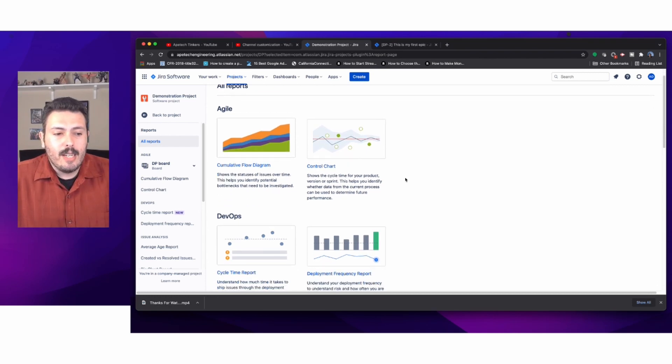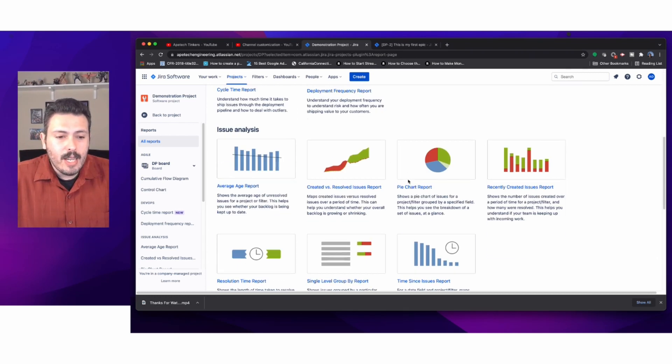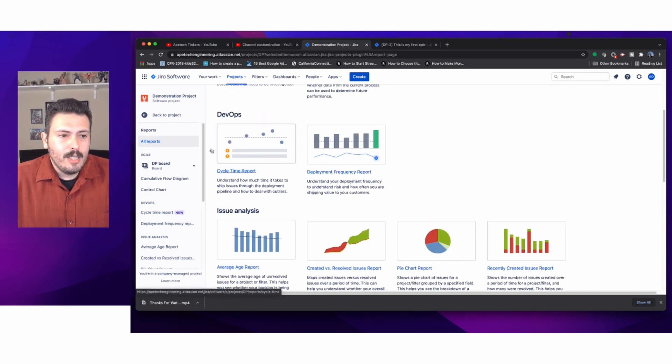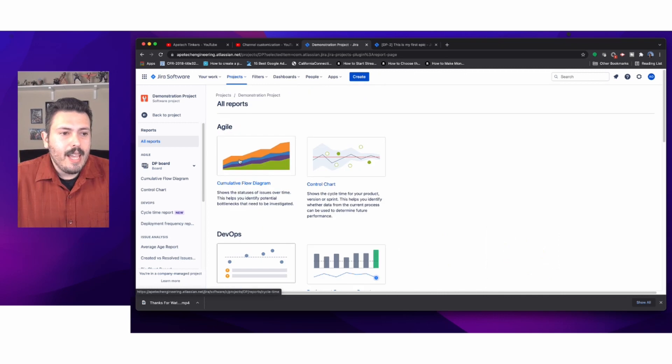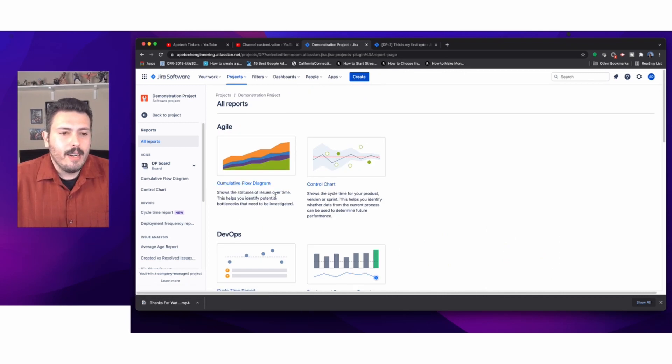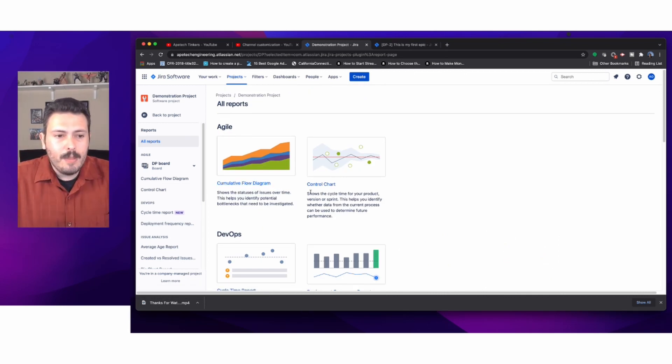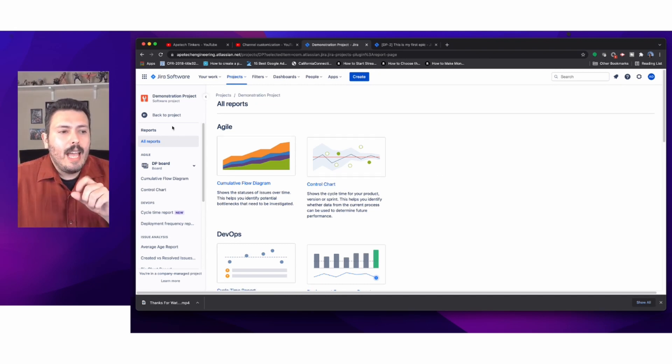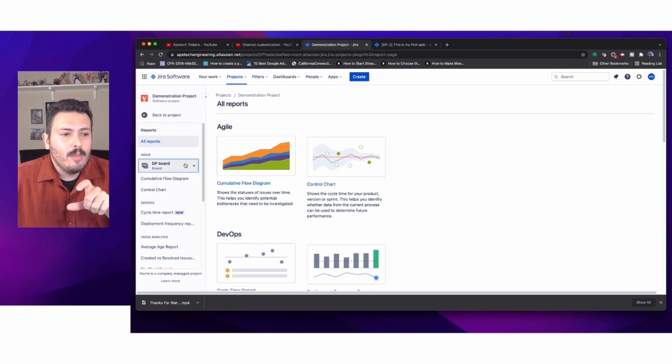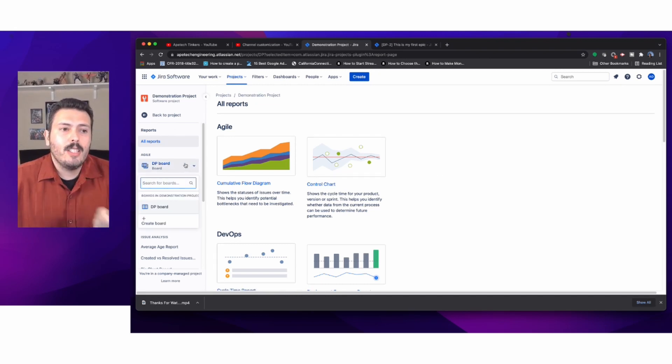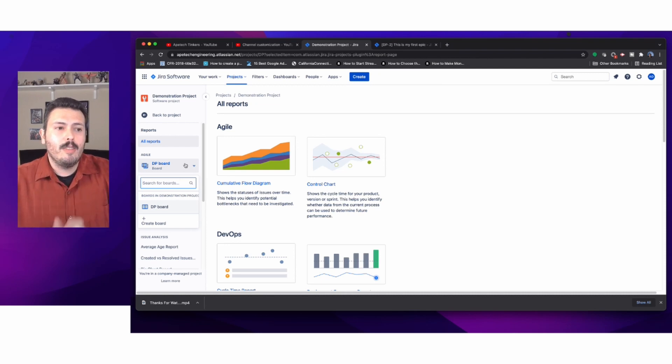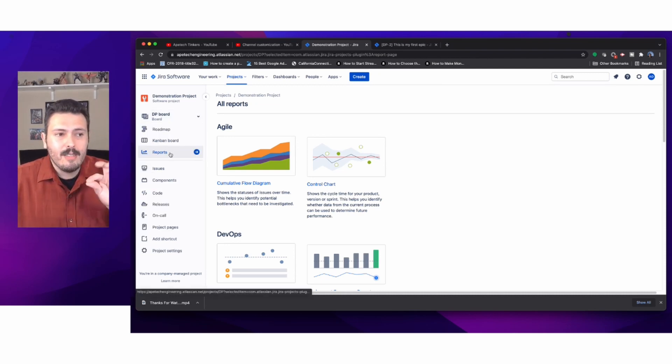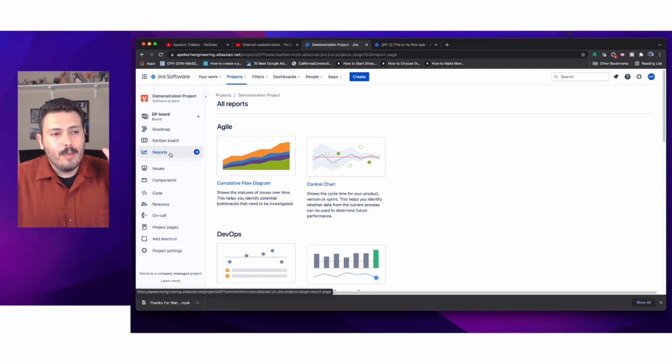You're just going to get the reports here that are appropriate for the metrics that Kanban usually tracks, and cycle time is one of those things. You'll see this and the cumulative flow diagram. As you toggle from board to board within that same project, you can alter the reports that are visible. These reports are guided or dictated by the board type you've selected.